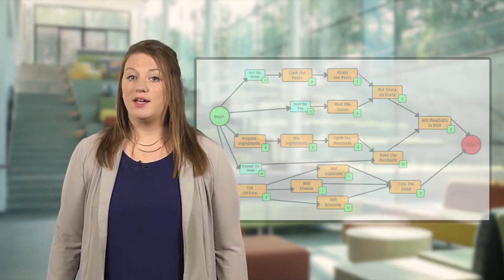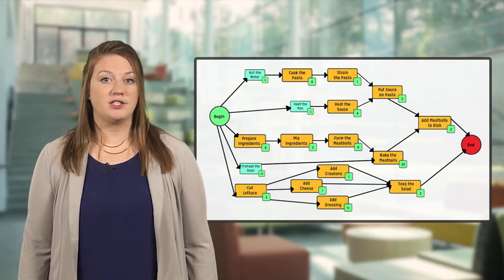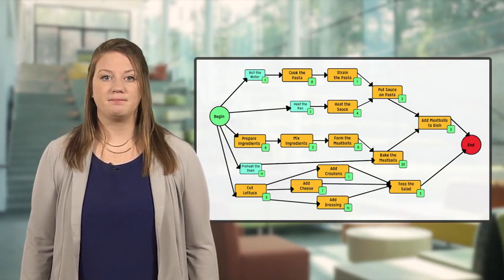You want to schedule the tasks in the critical path first. All the other tasks can take more time without adding time to the project. This is because there is slack in the project. Slack occurs when a path from beginning to end has a smaller estimated time than the critical path. In our example, we have 4 other such paths with some slack.